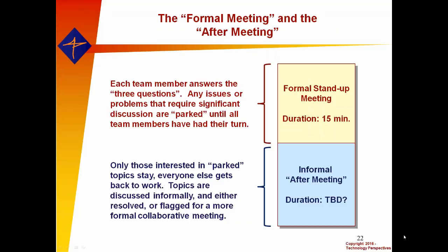I mentioned again, we have a formal stand-up meeting, 15 minutes, but often some technical issue will come up during the stand-up meeting, which causes people to go off on a tangent. And of course, your 15 minutes is going to be killed almost immediately. So one of the tricks that I've learned from some rough experience on this is anyone on the team can propose that we park an issue. Not just the team leader, because they're often the worst. They'll dig in, and it becomes a 2-person conversation. So anyone can say, hey guys, let's park that.